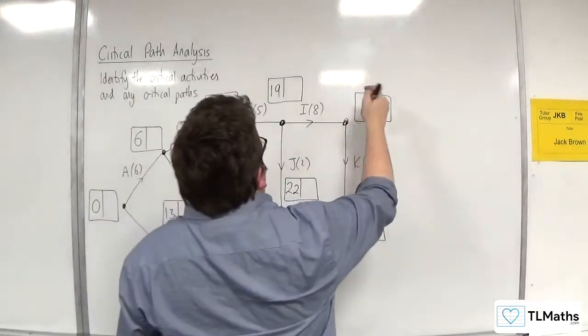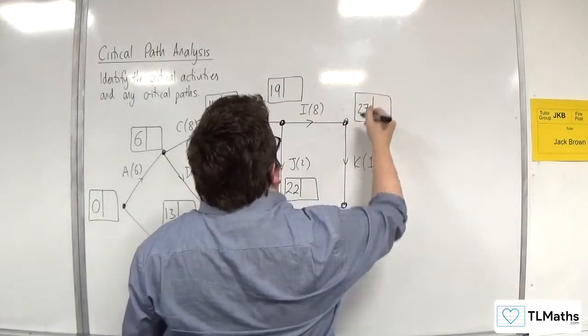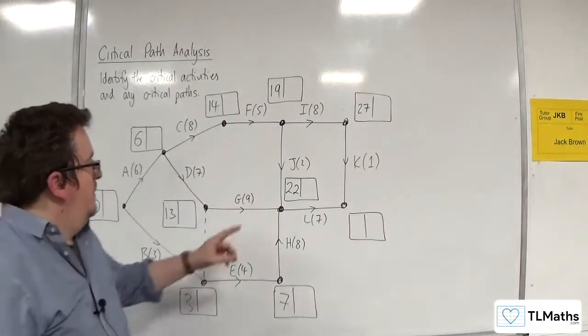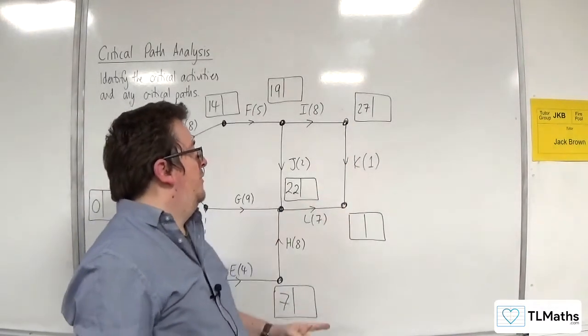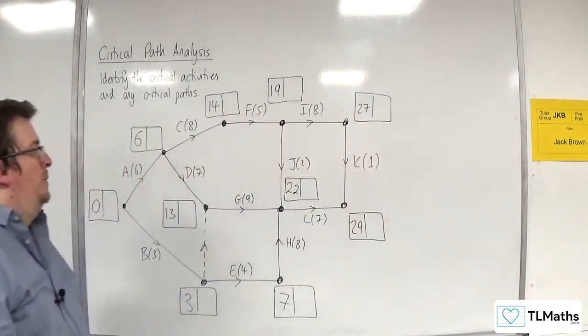Now for this one, we've got 19 plus 8, so 27. Just about to say 17, 27. Then we've got 22 plus 7, so 29, or 27 plus 1, which is 28, so 29. So that's the forward pass.